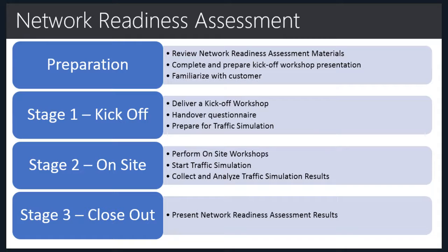Basically, the network simulation itself is nothing more than running a tool a couple of times, and most customers will run this on their own. Make sure that when you're scheduling these, they're done around the same time as the on-site workshop, so you can continue into phase 3.